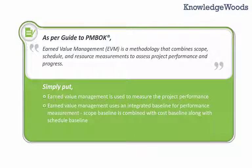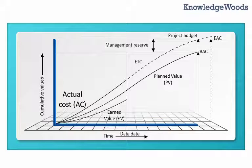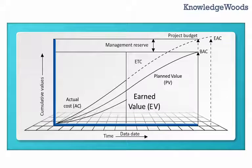Earned Value Management uses an integrated baseline for performance measurement. The Scope Baseline is combined with the Cost Baseline along with the Schedule Baseline. Planned Value always lies on the Budget at Completion line. Actual Cost of a project can be more or less than Planned Value. Earned Value can also be more or less than Planned Value.